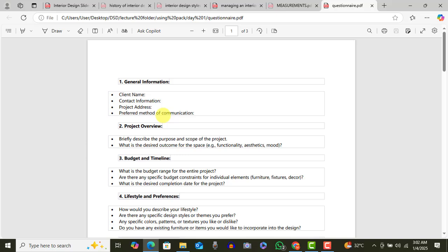Do you get it? There are a number of things you need to find out. There's this project that I'm doing for a client, the landscaping one that I'm talking about. Initially she said, oh, we will not do the pavement. She asked somebody else who will do the pavement. We should just do our landscaping. Now when we started designing, she realized that there are a lot of things on one side that won't fit into our design. So now she came back, okay, we want you to add the garden lighting, we want you to do the pavement, we want to do all those things in addition. Do you get it? So now the scope has changed. So now your budget will also change. You need to establish all that.